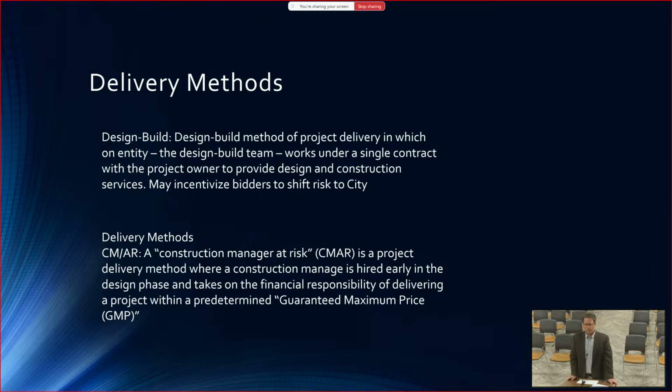It's more complicated, more time consuming, probably more expensive, but it's got a great track record of delivering good projects, particularly complicated projects. I was talking with Rob before. If you were building a road section, probably not design build, because the specifications are fairly well known. Lots of contractors can do it. There's not a lot of surprises there. But if you're doing wastewater treatment, where there's lots of different options and alternatives for how you do your treatment stream, design build is a great way to go, and I think probably becoming the primary way that folks go.